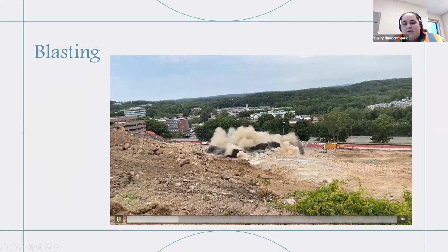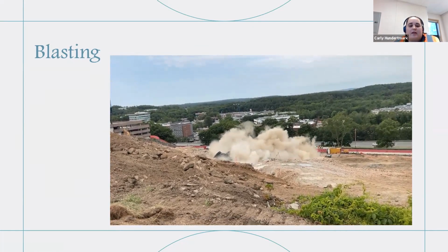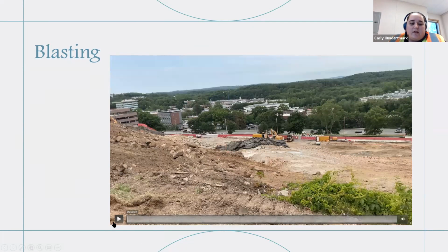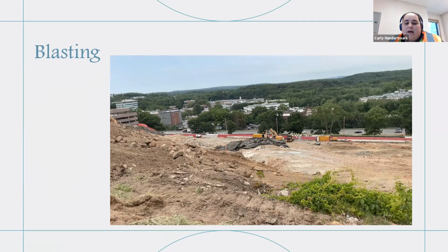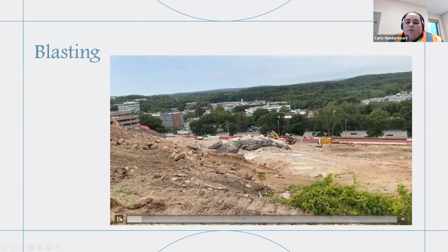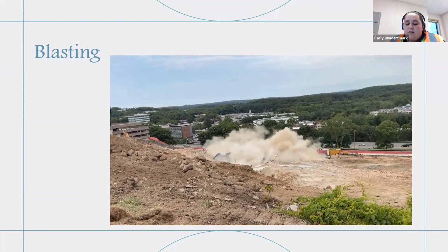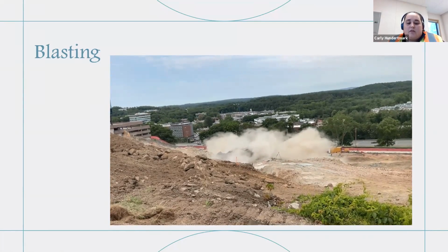Basically, there's a bunch of mats on it, and it gets blown up. We usually have about 2 or 3 blasts a day. I'll show it again real quick. These mats on top, the black stuff, are cut-up tires strung together in mats. They help make sure no debris or rocks go flying everywhere, because there's a highway in the background and buildings on either side, so we want to make sure people are safe. Let's show one more time. You get to see the big blast. It makes a huge vibration and a pretty loud bang too, because we're blasting into rock, which is kind of cool.